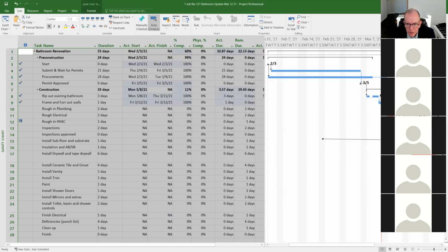And what that does is it looks at everything to the left of the status date. Mark on track looks everything to the left of the status date and we'll just update it up to that point and complete it. Now in this particular case, everything is 100% complete, but if this one crossed here, then it would calculate, it's 67% or it's 80% or whatever it is, it would calculate it for you. So it's not like you got to figure out what percent is done up to that point.